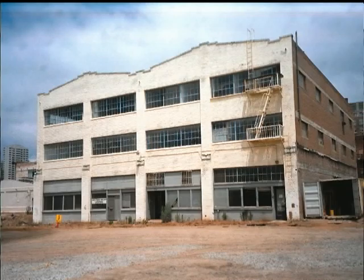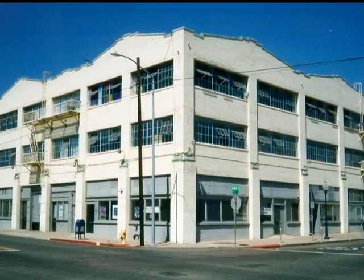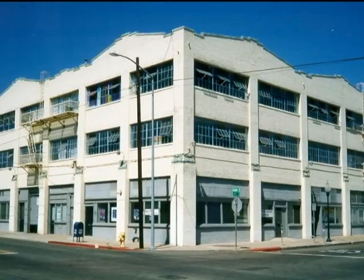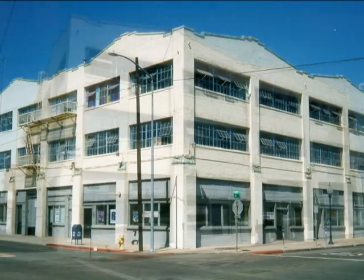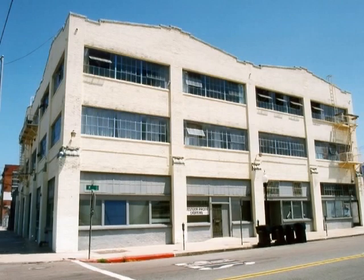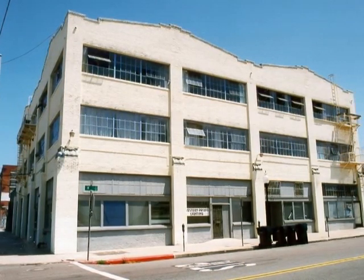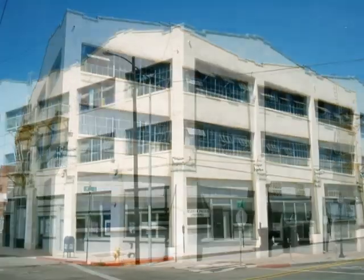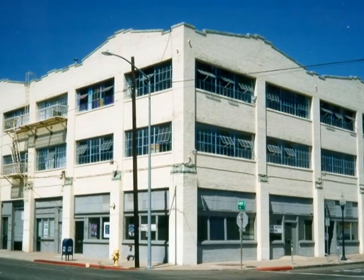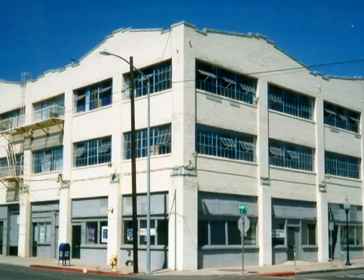1. The candy factory, originally built in 1924 as a warehouse, is a 101-foot square, 30,000 square foot, 3-story unreinforced masonry wall-bearing structure. It has a height of approximately 45 feet, including the parapet. The total weight of the structure when moved would be about 1,500 tons, which included 603 tons of temporary support structure. 2. Since the building was a historic structure, as much of the existing brick as possible would have to be saved for the renovation scheduled to occur after the move.